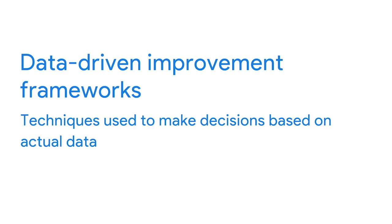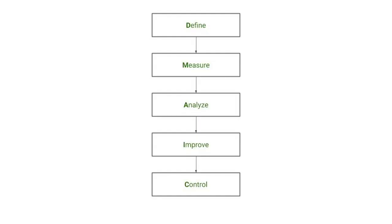In the last video, I introduced the concept of continuous improvements and explored how working in a controlled environment can optimize your outcomes. In this video, we're going to keep uncovering methods for continuous improvements, starting with data-driven improvement frameworks — techniques used to make decisions based on actual data. The first framework we'll cover is DMAIC, which stands for Define, Measure, Analyze, Improve, and Control, mapping out five steps you can take when working toward continuous improvements.